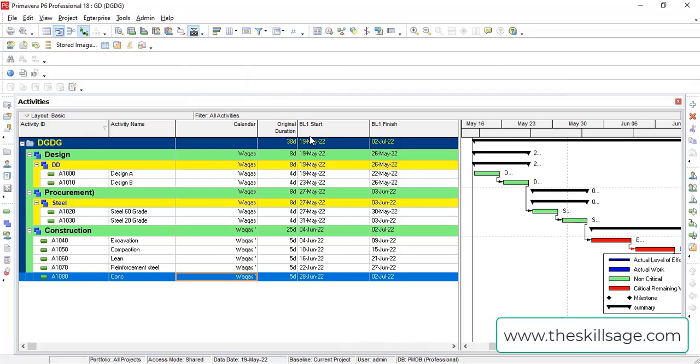See, my days are changed because I have given a different input. Before this was going to be done in 36 days. It's a very simple example I am giving you: how calendar customization from work package to work package is going to define your project timeline. So be very careful when you are going to work on calendar. It's very important. Sometimes we need different kinds of calendar on different work packages. It depends on our working hours and it is going to impact on your timeline.